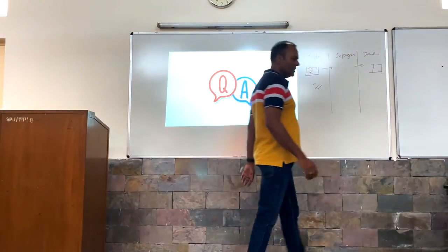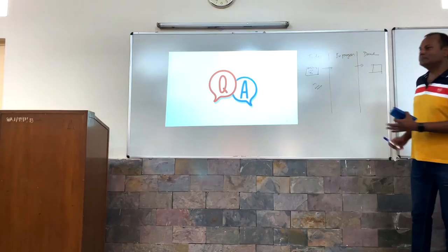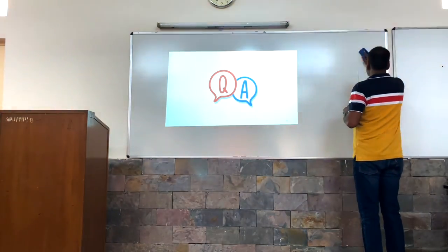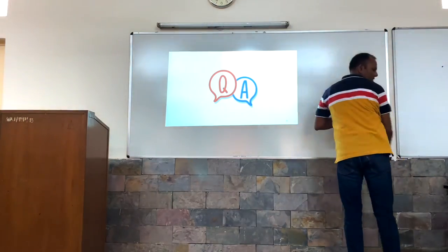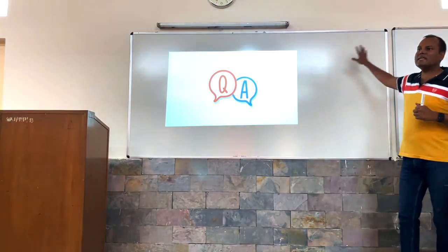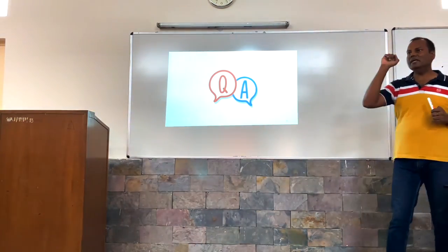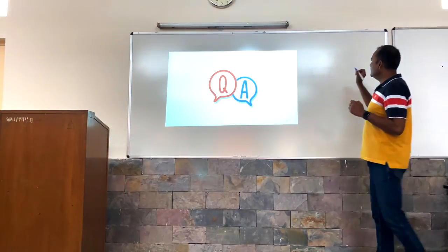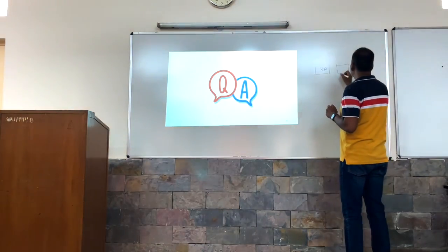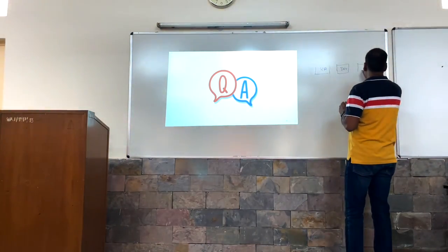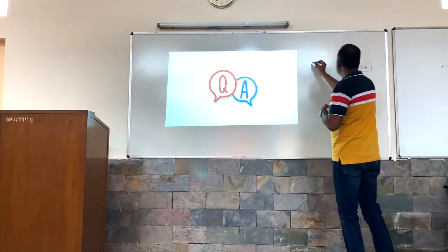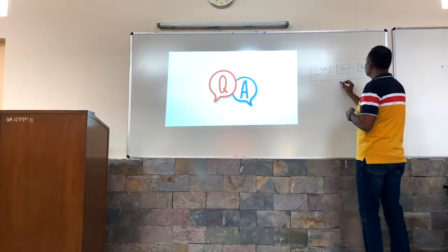Okay. So the Scrum cycle, let me explain to you. In Scrum, we perform all the cycles in just 15 days. If you have 15 days of sprint time, we are going to do requirement analysis, development, testing, UAT. So your application is part of UAT. Everything in just one sprint, 15 days.